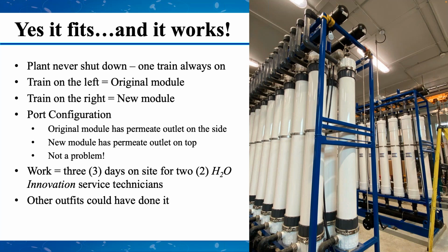And it's often a critic on the open concept that says it doesn't really work, it's complicated, you have to change everything. And here you can see on the photo that if you design your rack properly, there's really no impact, and it can be done very easily. The amount of work was 3 days on site for 2 H2O Innovation technicians to be able to do that work. What's interesting to mention is we, as H2O Innovation, we did not have to do this.